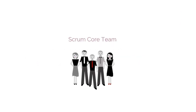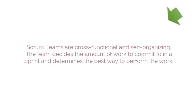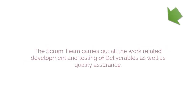Scrum Core Team. The Scrum Team, also referred to as the Development Team, is a team which is responsible for estimating user stories and delivering the project deliverables. Scrum Teams are cross-functional and self-organizing. The team decides the amount of work to commit to in a sprint and determines the best way to perform the work. The Scrum Team carries out all the work related to development and testing of deliverables as well as quality assurance.